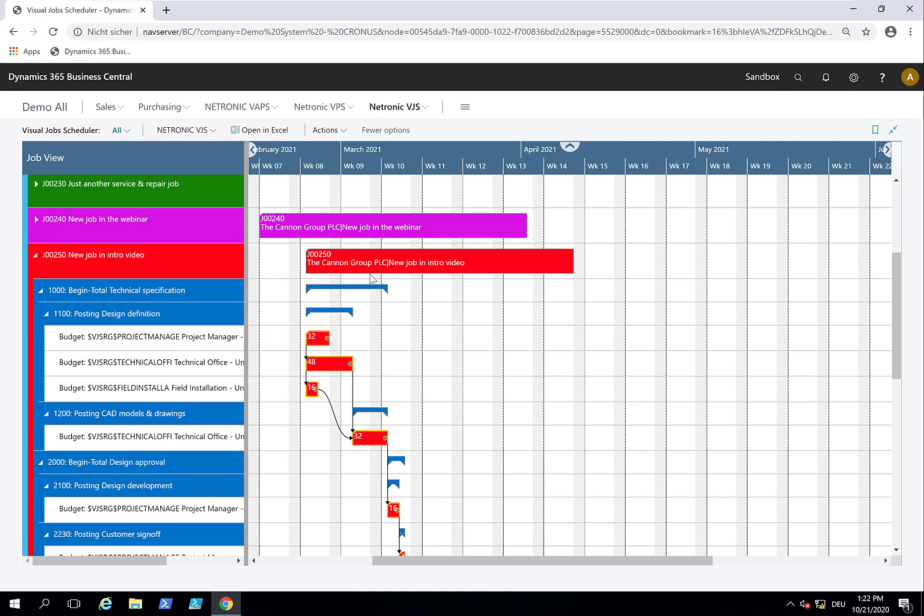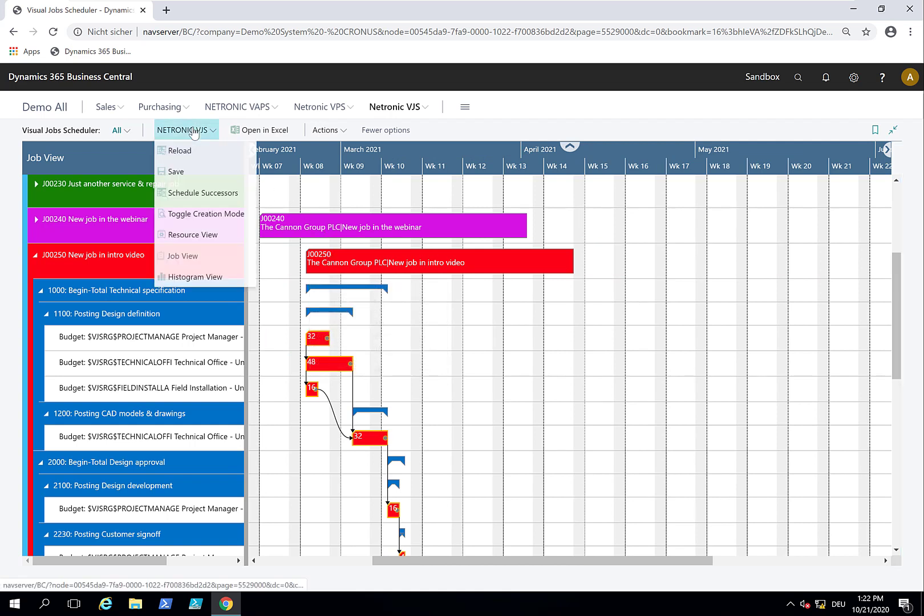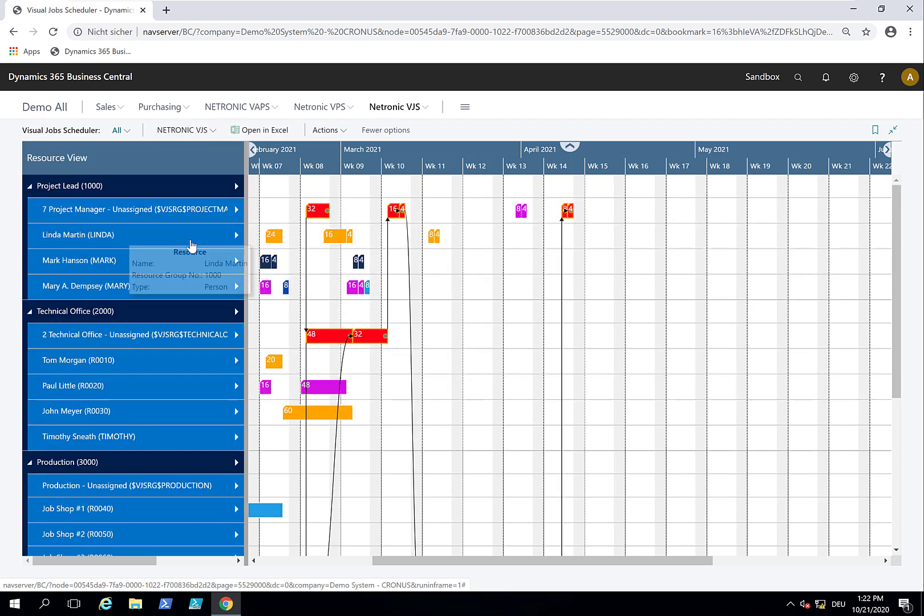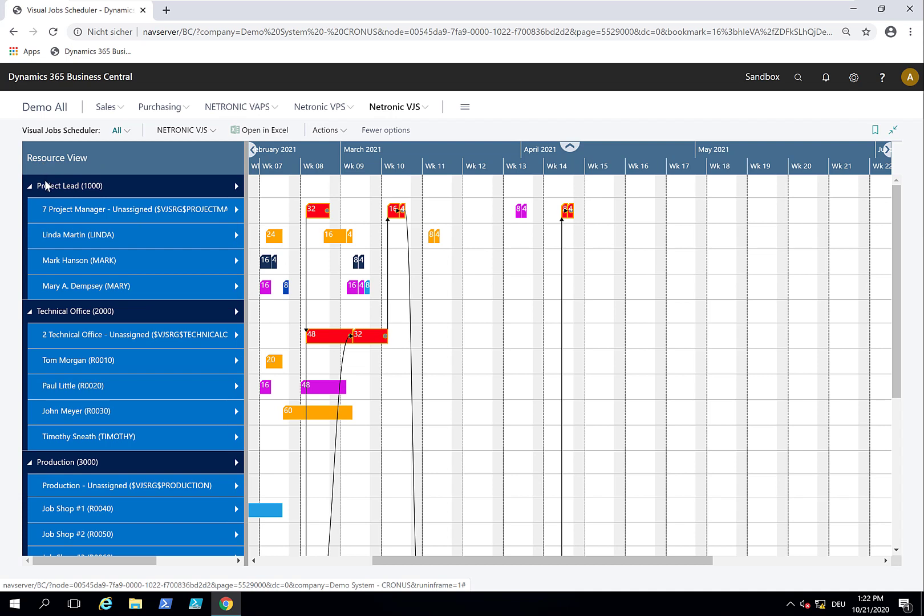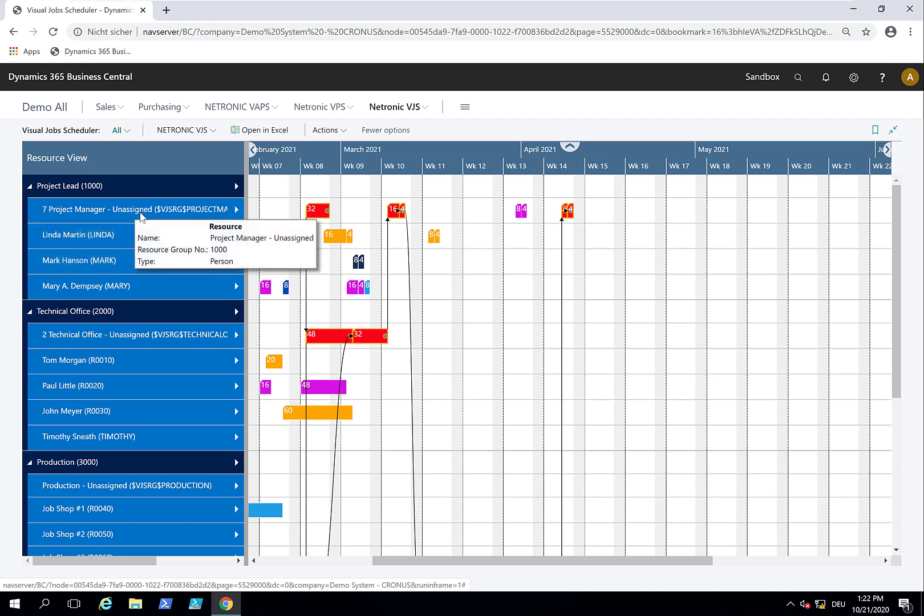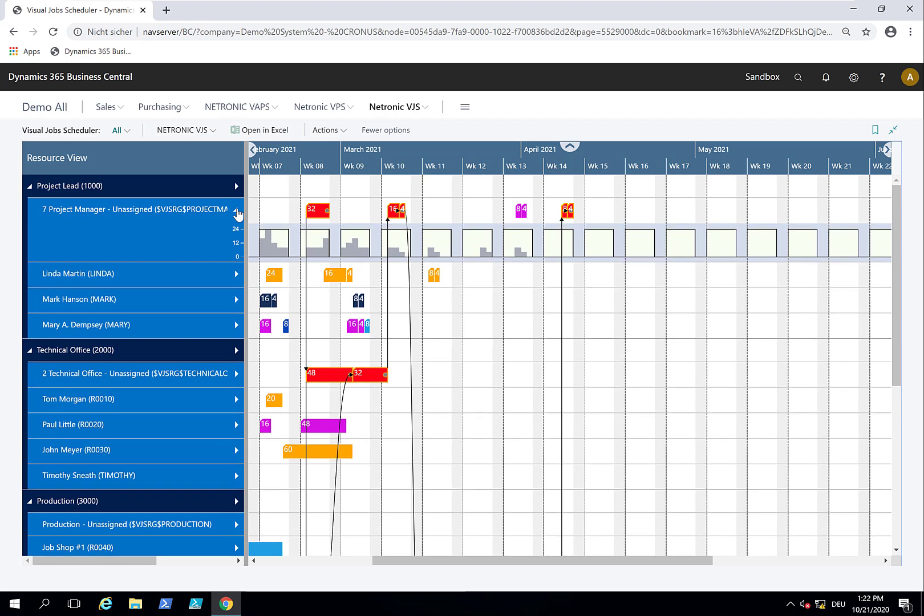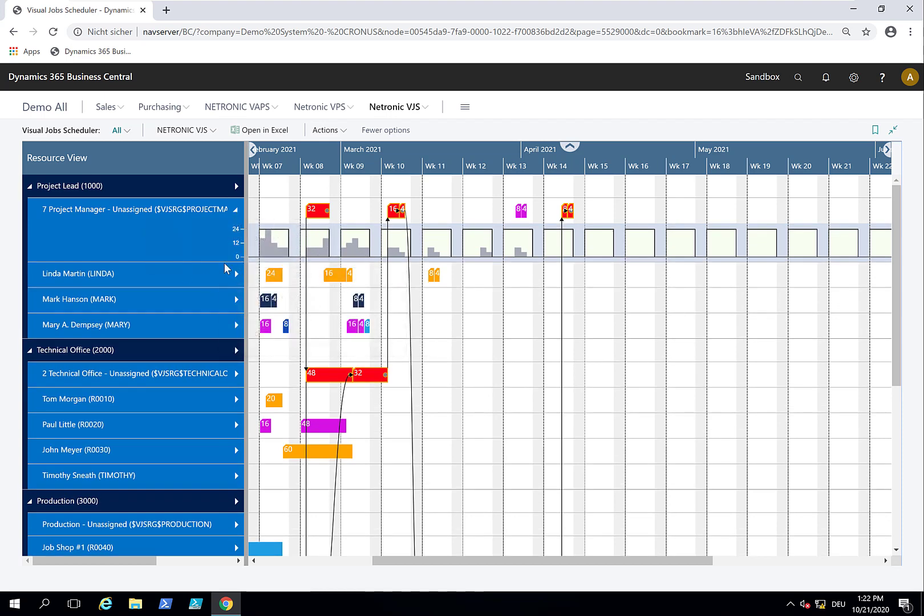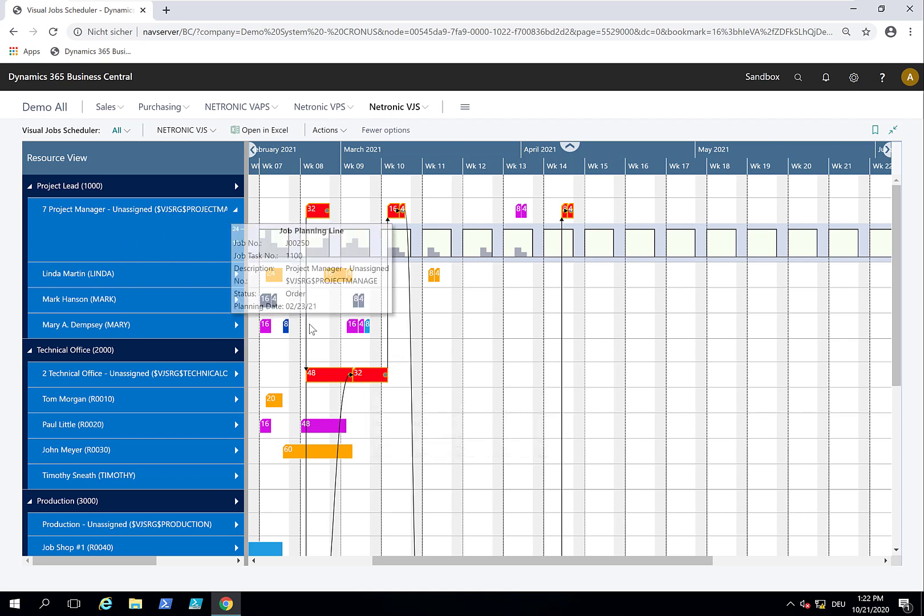Now let's look at the same project in a resource view. We switch the view, go to the resource view, and we see the same project, but now the same data structured by resource groups and resources. Everything is scheduled to what we call a virtual resource here. This is a resource group that gives you the aggregated utilization of this group.